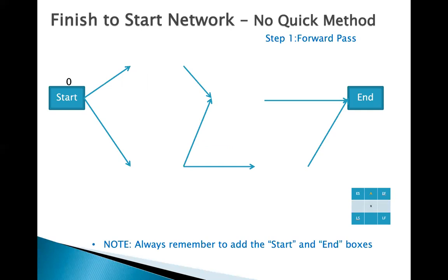Remember, in order to complete step number 1, we need to define for each activity the early schedule, which is the early start and the early finish. For activity A, the duration is 5 days. We can start right away, so the early start is 0, because the information we are receiving from the exam question is that activity A and activity C can start right away.